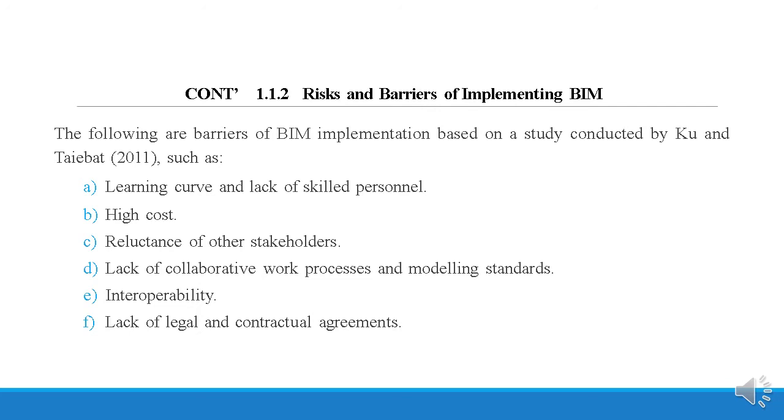The following are barriers of BIM implementation based on a study conducted by Koo and Taibat 2011, such as A. Learning curve and lack of skilled personnel. B. High cost. C. Reluctance of other stakeholders. D. Lack of collaborative work processes and modeling standards. E. Interoperability. F. Lack of legal and contractual agreements.